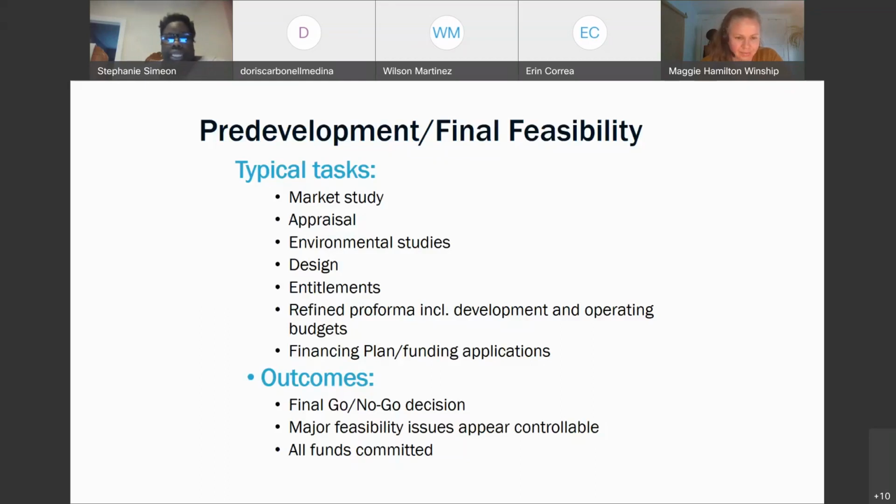If you're a person that's like, well, I'm not really good with finances, get a strong person that is, and they know these budgets well. A strong grant writer, a strong feasibility person, you need to have that in place. Again, the goal is, is this a go or no go? At this point, after you've received all these reports, and if you have any questions or concerns, if you're not too sure, this is go time. Are we moving forward? At this point, you've spent $10,000 in reports, or more. So is this a go or no go?